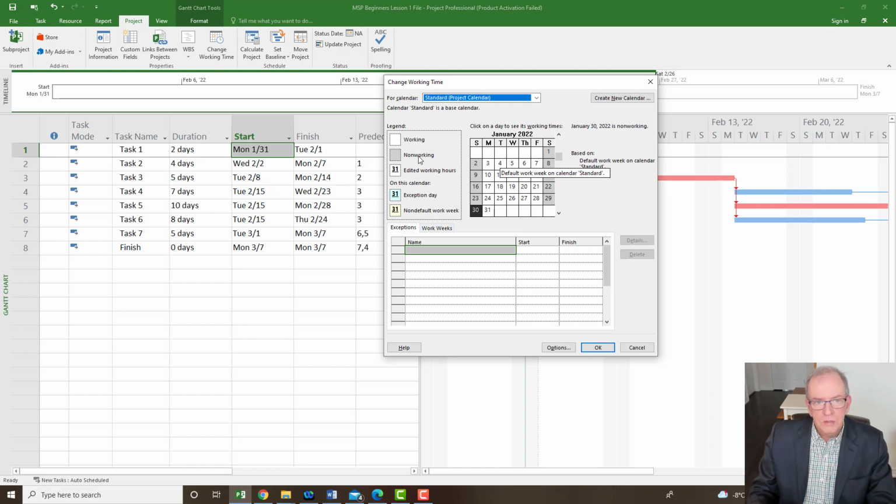And you'll notice that there's a bunch of hatchings here that kind of shows what's working. So that's blank, that's working. Non-working kind of has this shaded area. If I edit something, it'll sort of show it bold to show that you have done something to this cell. So the hatchings can be useful for you viewing it. Now I'm going to put in some holidays.